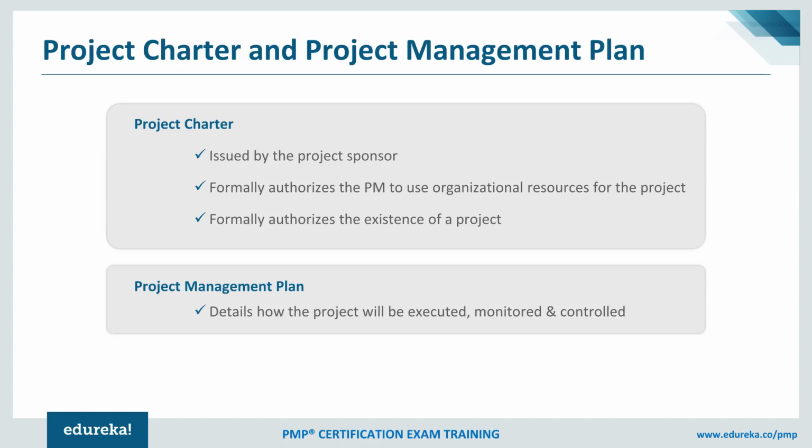Apart from that, you would also have in the project charter things like what is my start date and the end date for each of the key milestones that I've agreed to with the stakeholders, etc. Then who are my signing authorities? Who is going to give me sign off on some of the key milestones when I go on achieving them? Then a bit on cost, whatever is mentioned as part of the business case.